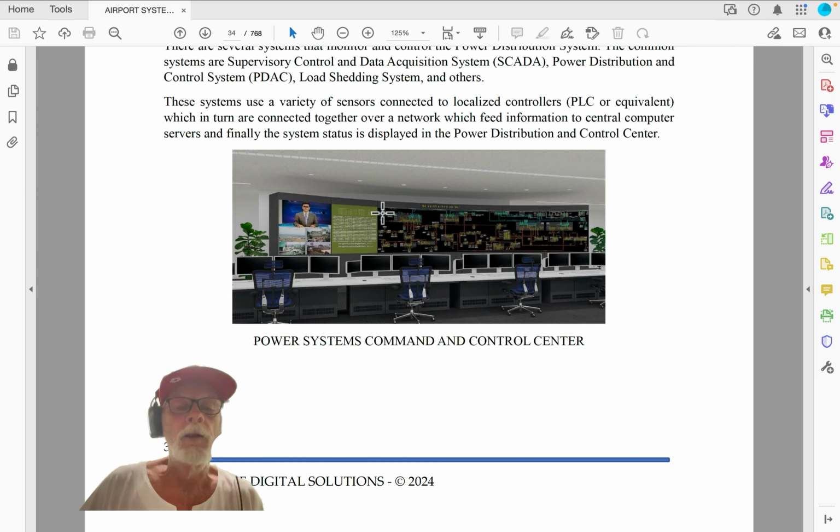So if you write specs today, 3 years from now, those specs are generally speaking going to be somewhat obsolete. So it's good to have a technology master plan ahead of time, because if you don't have it ahead of time, you're going to be installing trailing edge technology by the time the building's built. And this is especially true for any new building.